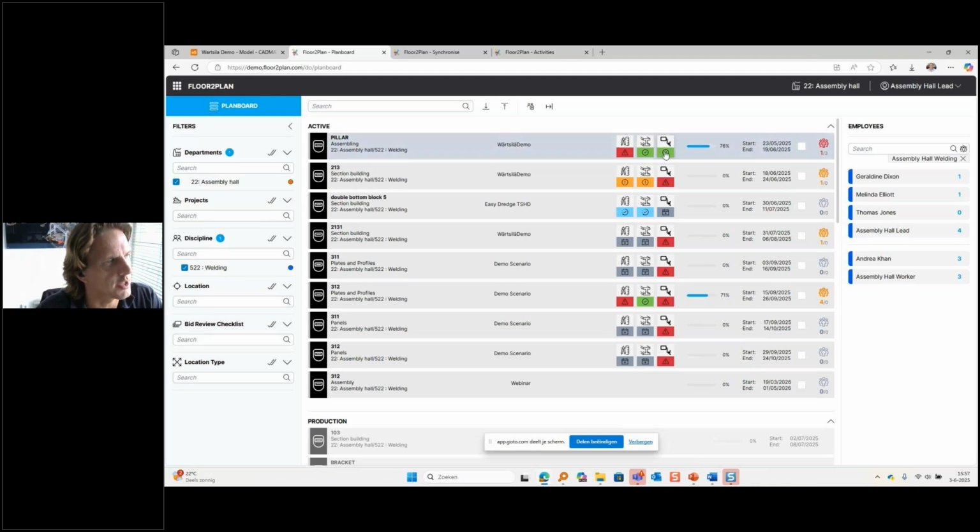The predecessor is ready, the material is ready, but there's an engineering change that is pending. I also see that, well, this is red, meaning we don't have sufficient workers on this task to be ready in time. This here is orange, means that we do have sufficient workers. But as you can see here in the red and here in the orange, there's a problem with this work. So there's a limitation on task readiness. And I will show you subsequently what that means for finding an alternative scenario on behalf of the supervisor.